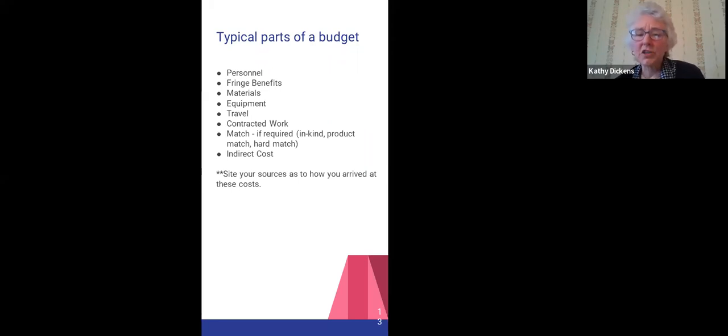And then the next section I have on here, some grants require match. I have one of these going on right now in my budget. It doesn't look all that beautiful, but I have it there. This particular grant that I'm working on has a 45% match. So the grant could give us 55% of the project, and I have to show that I have promised match of 45%. You have to have your people all lined up, and you have to have letters proving that you have that match waiting. It's ready and promised and approved if you should get the 55% grant ask.